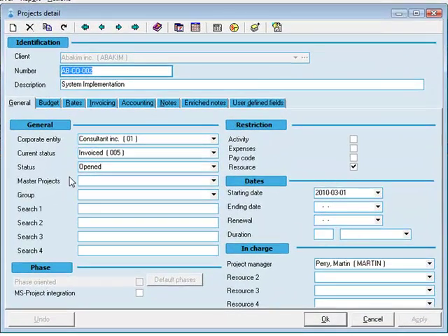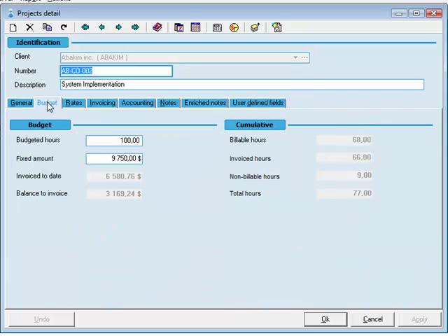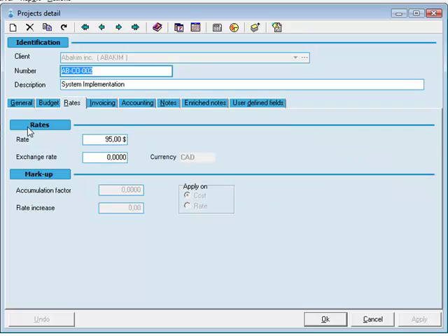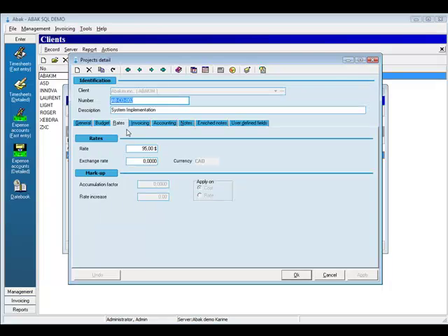When creating a project, you can set standard parameters such as status, start and end dates, and access restrictions. Budgets can be set at the highest level, where you can keep track of the contract and bill amounts easily. There are many places where you can set billable rates in the project. Project Default Billable Rate allows you to specify your rates on a project-by-project basis. Each project also has its own invoicing settings and accounting information, such as the GL entry.